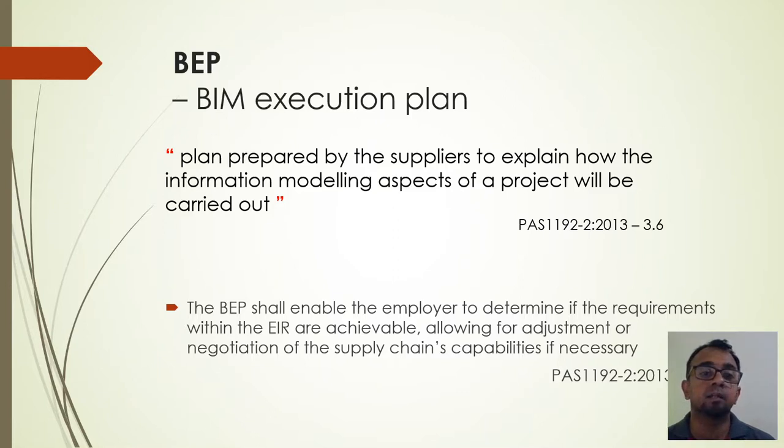The BEP shall enable the employer to determine if the requirements within the EIR are achievable, allowing for adjustment or negotiation of the supply chain's capabilities if necessary. You can see it is more like a pre-qualification document, but it is not a pre-qualification document as such.